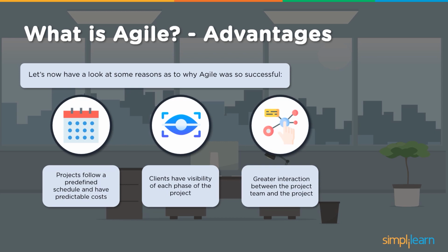Scrum in specific has something called the daily Scrum, a 15-minute meeting where the entire Scrum team should come in and sit together, a self-organizing team as well as the whole Agile team, and express what they have completed before the last daily Scrum meeting, what is pending, why it is pending, and what they are going to do before the next meeting. So all these are expressed.